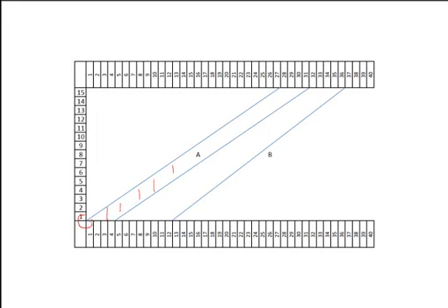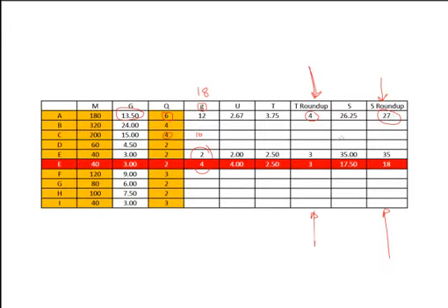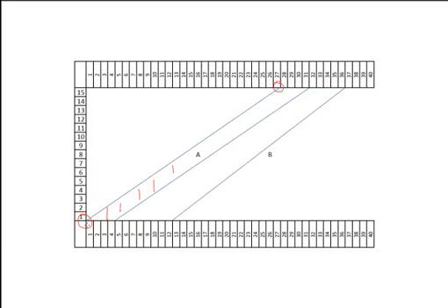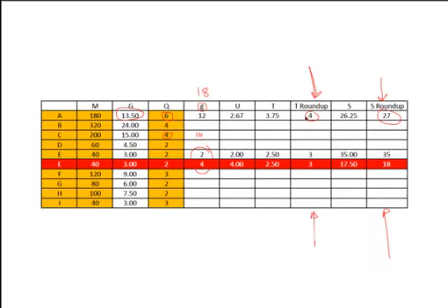It starts on day number 0 there, and it finishes on day number 27. So where do we get that from? Obviously from our table. Remember, day number 27 is the completion date. The project starts on day number 1 or day number 0, and that's why we start that line over there. So just connect the dots. There's the 27, and we know that there's going to be a 4-day delay. Why do we know that? Because we have it over there.